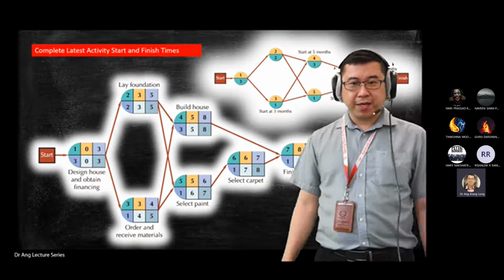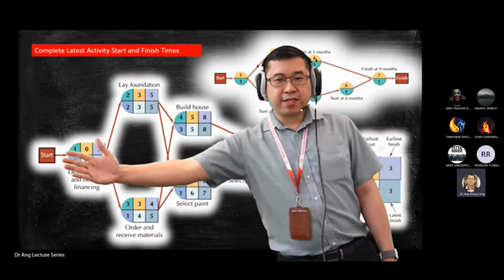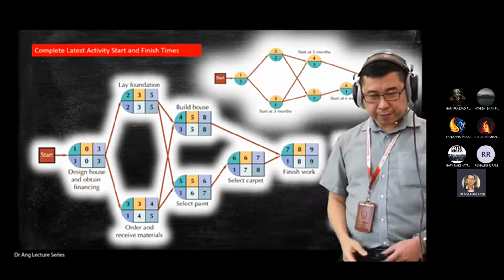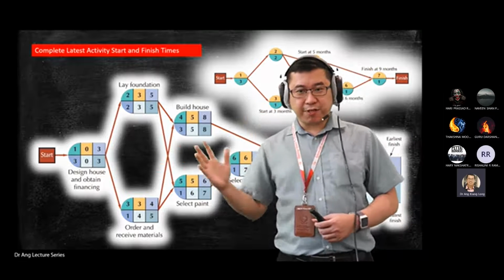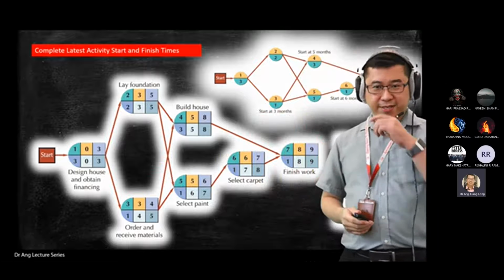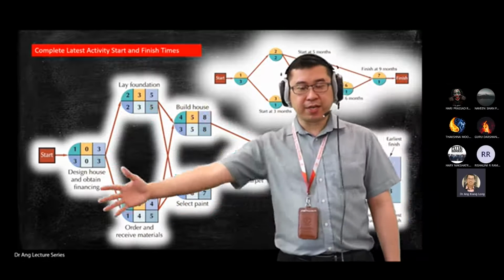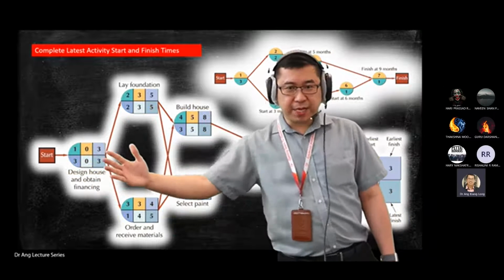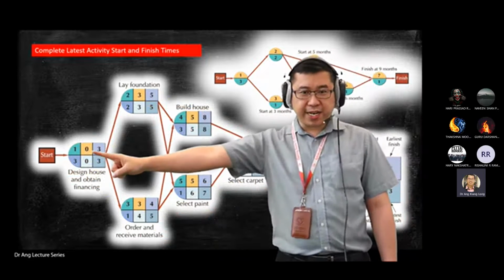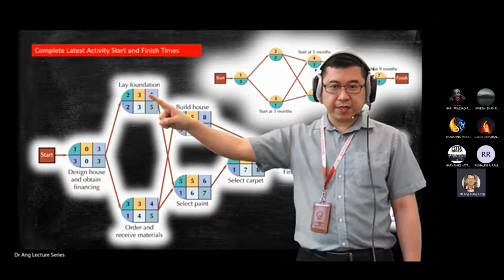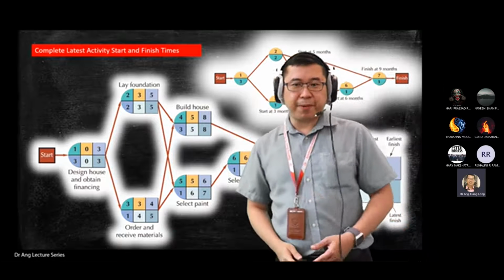Here the same. Okay. So this observation tells you that once you develop the 6 matrix numbers for each member, you are able to identify, based on observation, which is the critical member. It works in all AON diagrams or networks. So once you have these 6 matrix numbers for all the activities, you observe the second and the third column. If the numbers are the same, they are critical path members.